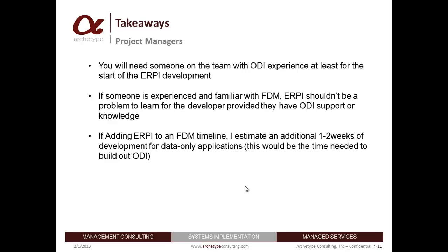If it is more complex, let's say you want to bring dimensions like an account dimension in or things like that, then you're going to want probably close to 6 weeks to build out that process and make sure everything's running fine.